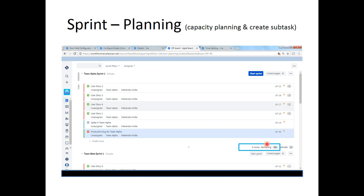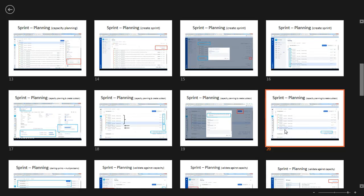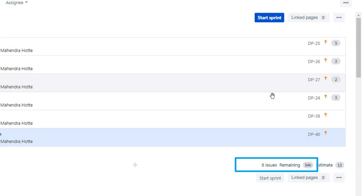As I explained how to task out User Story 1, I have now tasked out User Stories 2, 3, 4 and added a couple of tasks for the Spike and Bug as well. The remaining hours has now increased to 54. To accomplish the sprint goal, 54 hours of work need to be done. The commitment is 13 story points, and to achieve that we need to expend 54 hours. Now the ideal line on the burndown chart will start from 54.